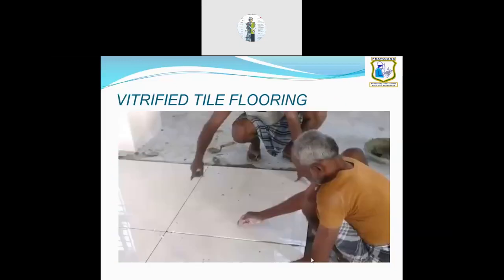So this is the tile laying with the spacer. You have seen the spacer blocks he has kept. He will do the joint filling with the same. Here, you also have to procure pigment of the same color, which will be given by the tile manufacturer. You should not fill for 5 days. You have to cure it properly, and the evaporation should happen. The heat and hydration should all come out. Only then should you start filling.